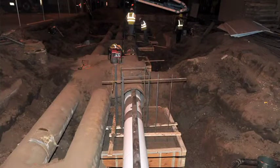There is a tunnel that goes under us here across 7th Street. There's steam lines that go under our project. The main water supply comes in right under our project, and so we had to work around all these details. And when we realized that the steam line that shows on the plan going straight across 7th Street doesn't, it turns and goes right under our footing line, right under our grade beam. So we had a month of delay there.